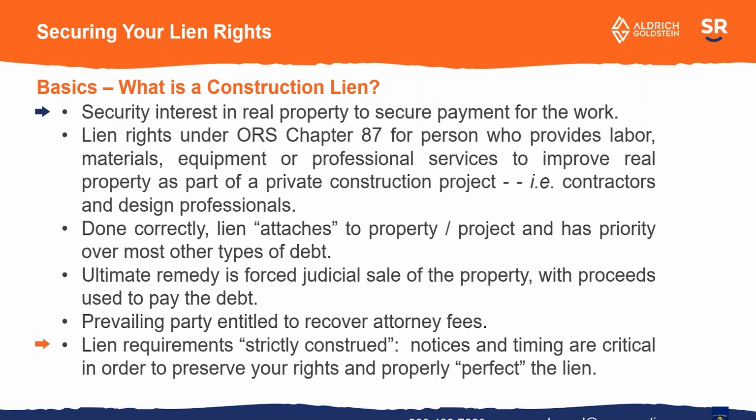You should know that the lien laws are what's called strictly construed. So your notices and timing are critical in order to protect and preserve your lien rights. Once you have the lien, it's a little bit more liberal, but you've got to cross all your T's and dot all your I's in order to secure those rights in the first place.